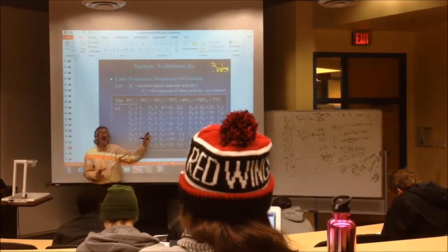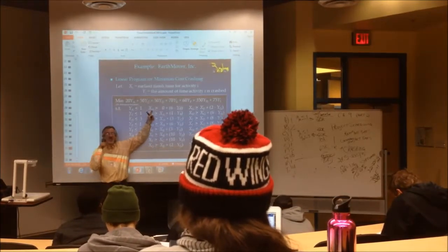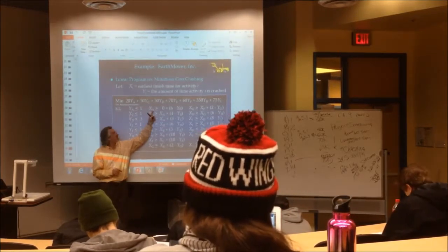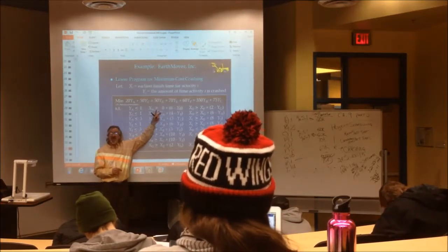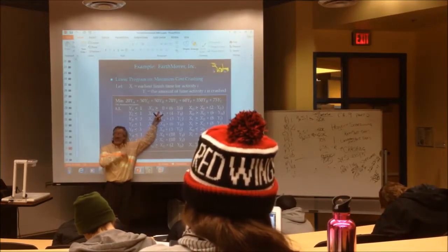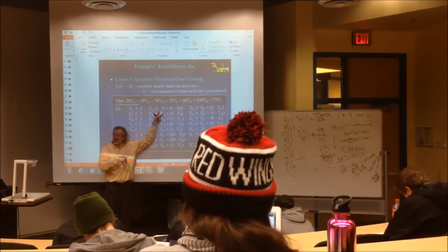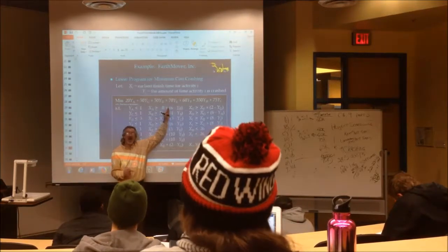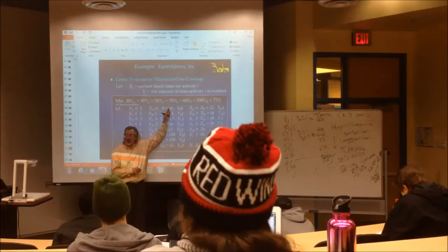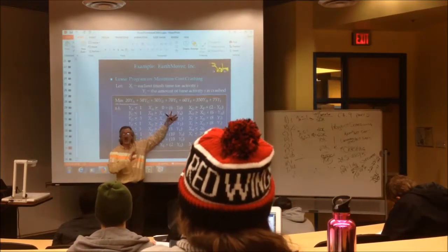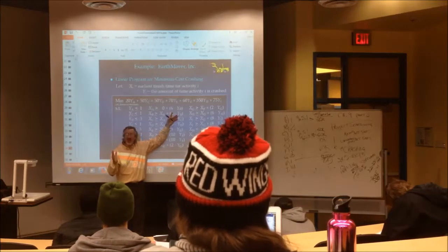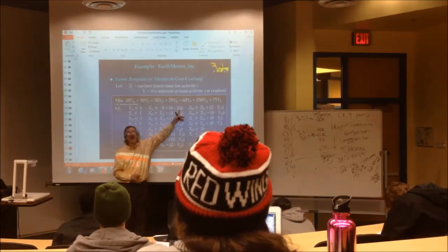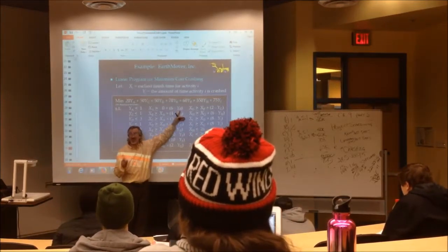When you're doing activity constraints, start with the x variable for the activity you're writing this for. Make it greater than or equal to the x variable of whatever activity precedes it. Everybody got that? Then add the normal amount of time the activity would take that you're writing this for. A usually takes 6 units of time before we crash. How much time would it take if no crashing were taking place? You get it? Normal time. Minus the y variable for the activity you're writing this for.